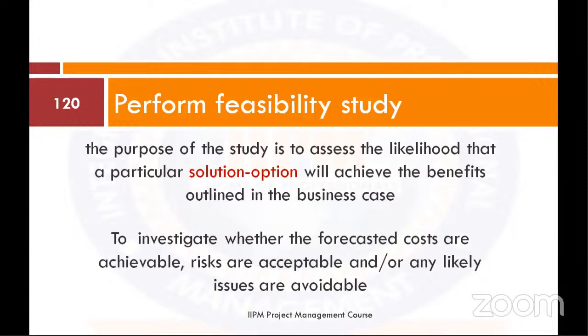In your business case, you gave us all the benefits and costs. Now, in feasibility, we want to justify. We don't know how you came about that business case, but in feasibility, you go to the target audience, where those outputs will be used, and justify the information you've provided in the business case.